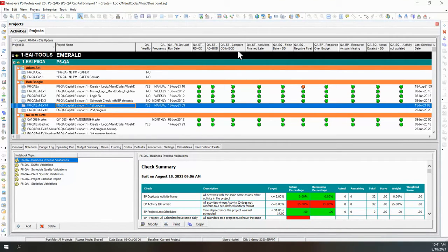You also want to watch dates. You want to watch whether the activity is planned is now forecasted to be finished late, because you want to see those, right? Now, some of them might be okay to be late, but others may not be. So you want to be watching that. So we're flagging them explicitly in the system.